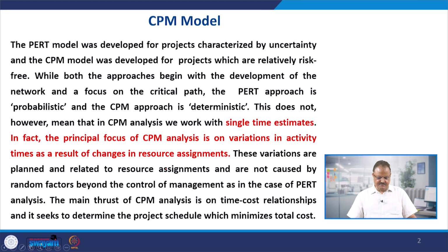So they are used for projects with a deterministic orientation, where most of the things are pre-tested, and we know that if we start working on that venture we will be able to reach the end. The amount of uncertainty would be very little. Either there is no uncertainty, or if it is there, it is very small. In those kinds of projects, we apply the CPM model.